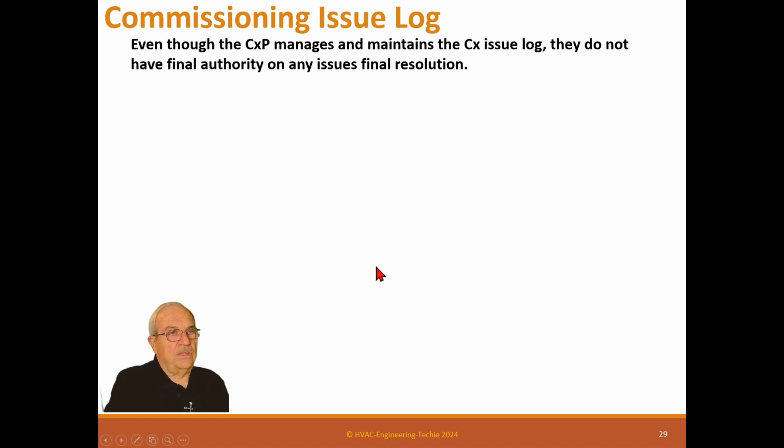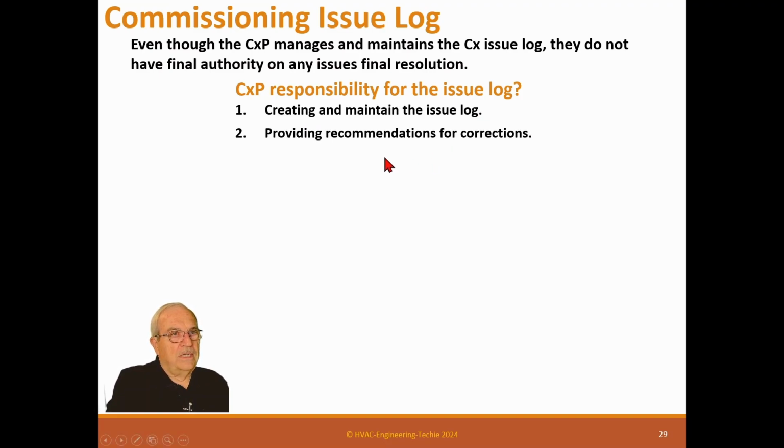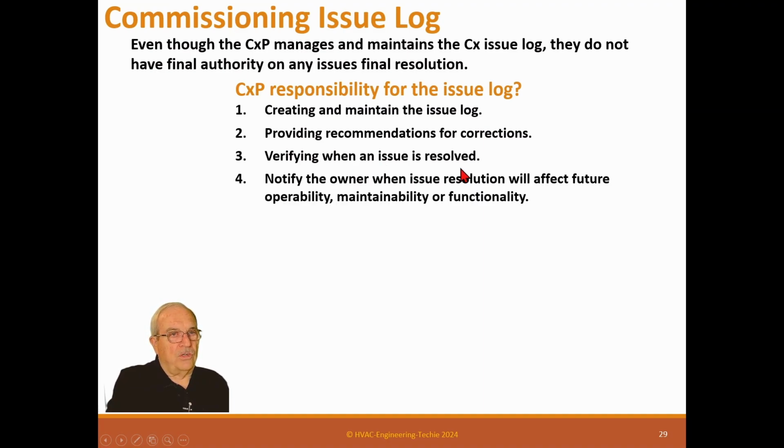Even though the CXP manages and maintains the issue log, they do not have final authority on any issue's final resolution. Remember, you don't have any authorities. You can't actually approve something. The CXP is responsible for the issue log, to create and maintain it, provide recommendations for corrections, again, a responsibility, verify when an issue is resolved, that you can certainly do,